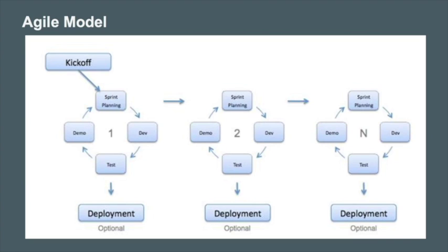Now, there is a question: when to use the agile model? When new changes are needed to be implemented, the freedom Agile gives to change is very important. New changes can be implemented at very little cost because of the frequency of new increments that are produced. Second, to implement a new feature, the developers need to lose only the work of a few days or even only hours to roll back and implement it.